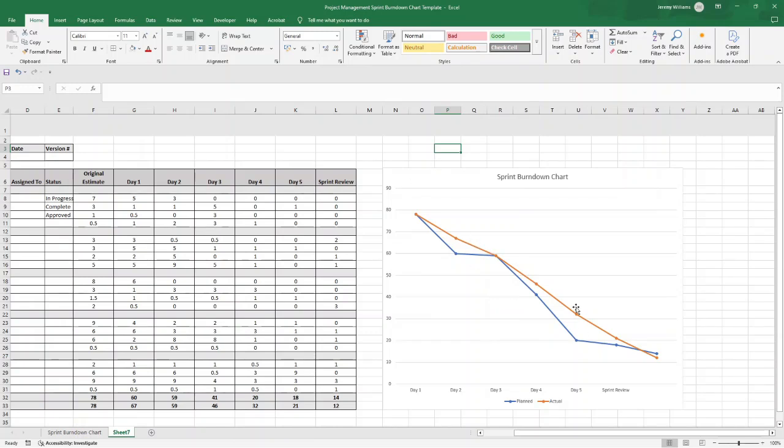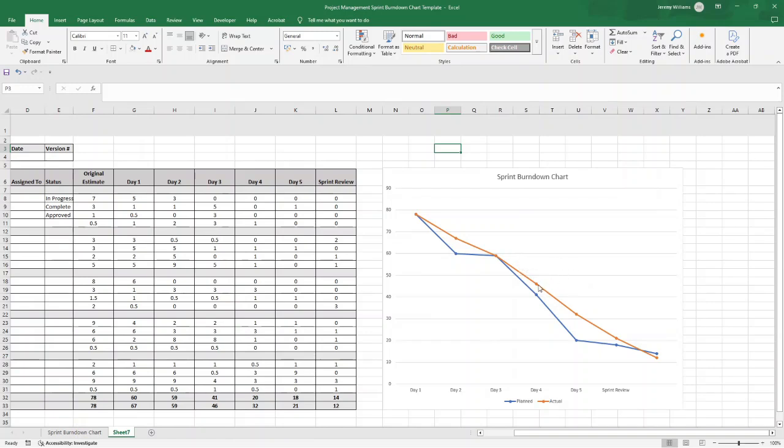The Plan is essentially the ideal here. You can basically see in this example that your team remained behind schedule for the majority of the sprint, so the orange line is above the blue. This pattern is common as teams often face initial challenges and unexpected complexities. Despite starting behind, the team actually maintained steady progress throughout the sprint.